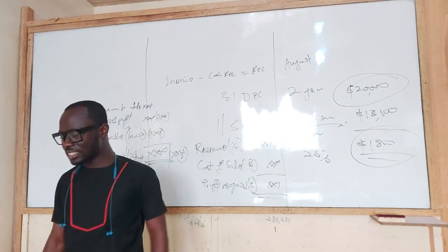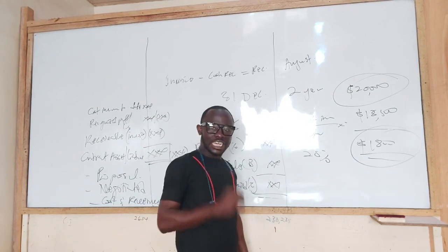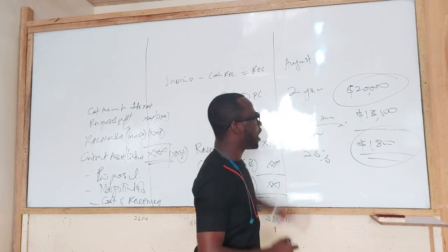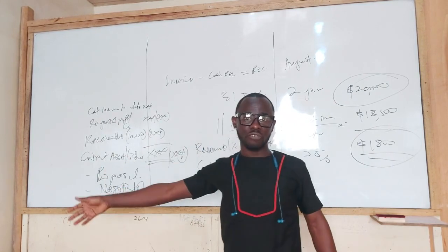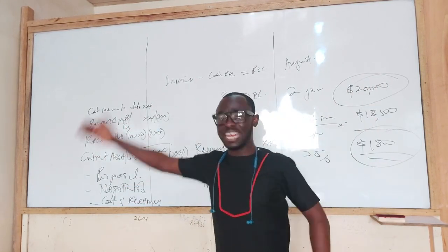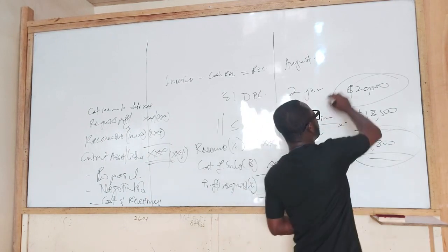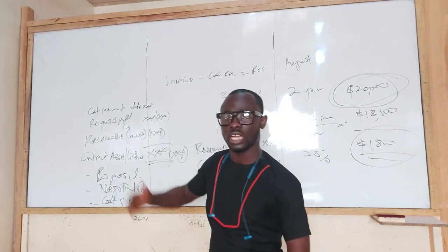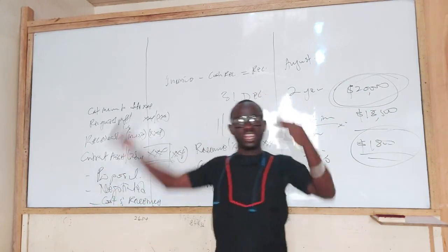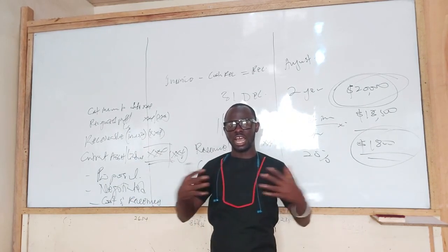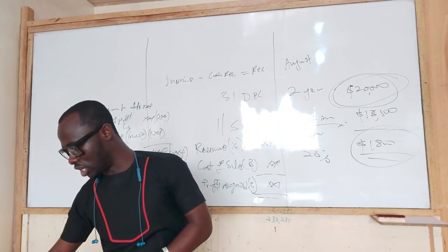Then two, the price of the asset is negotiated without regard to the original price. So if the price of the asset is negotiated without regard to the original price, so the hospital, we are charging $20,000. Then the toilet, they said we negotiated that differently for say $5,000. In that case, we have to treat the additional asset as what? A separate contract. But then, if during the negotiation they said, oh, we are paying you $20,000, can we add some $2,000 so that you can do the asset for us? Meaning that they are making reference to the original contract price. Then in that case, the additional asset will be treated as a single construction contract in conjunction with the original contract in relation to that.